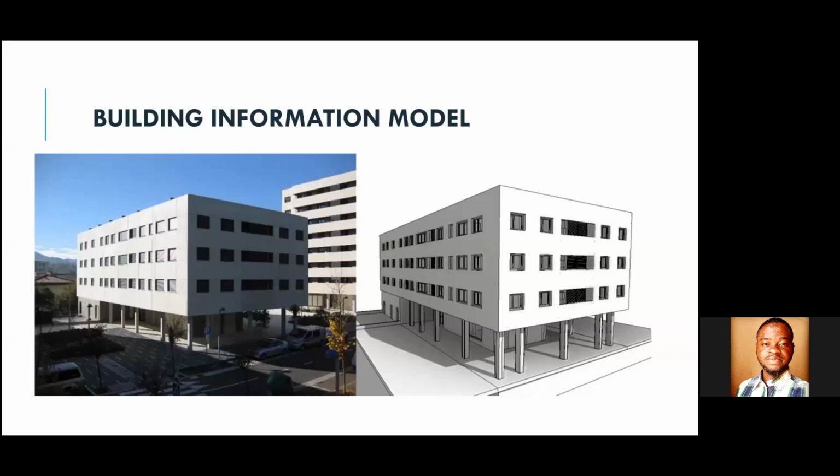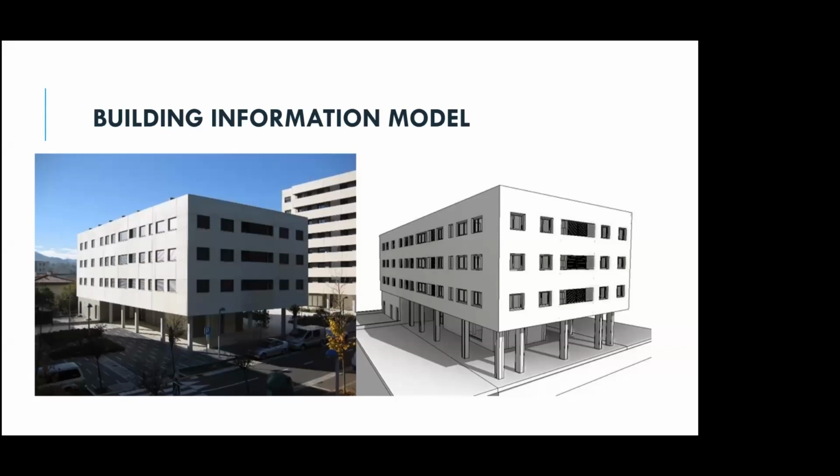And after creating a virtual environment, we check each and everything, whether whatever we have created is feasible or possible on the site or not. If that is possible on the site, if everything is fine, and there is no particular conflict or clash between two different elements, then and only then will we export all that data, create drawings, create documentation, and then we will do the actual construction.